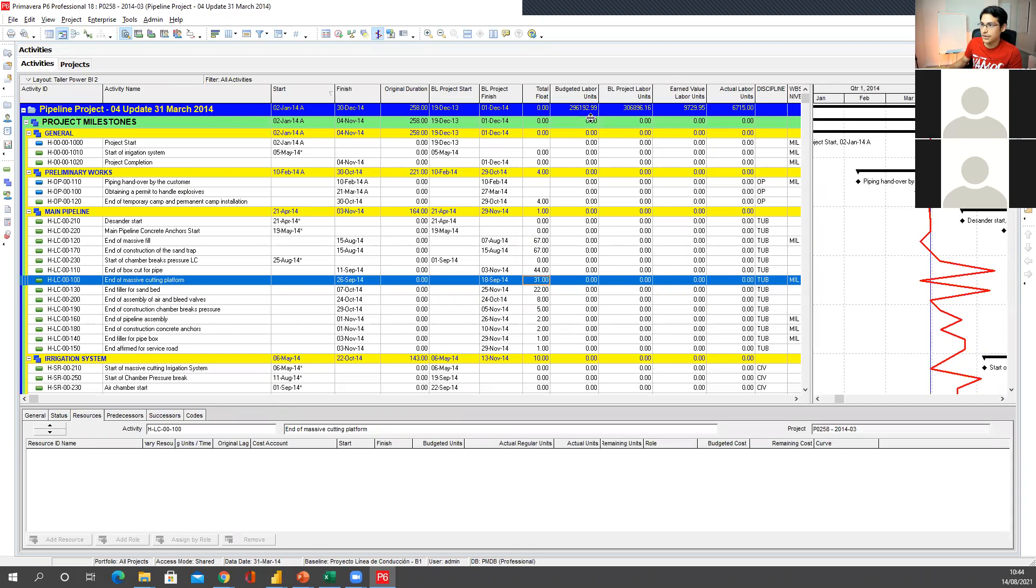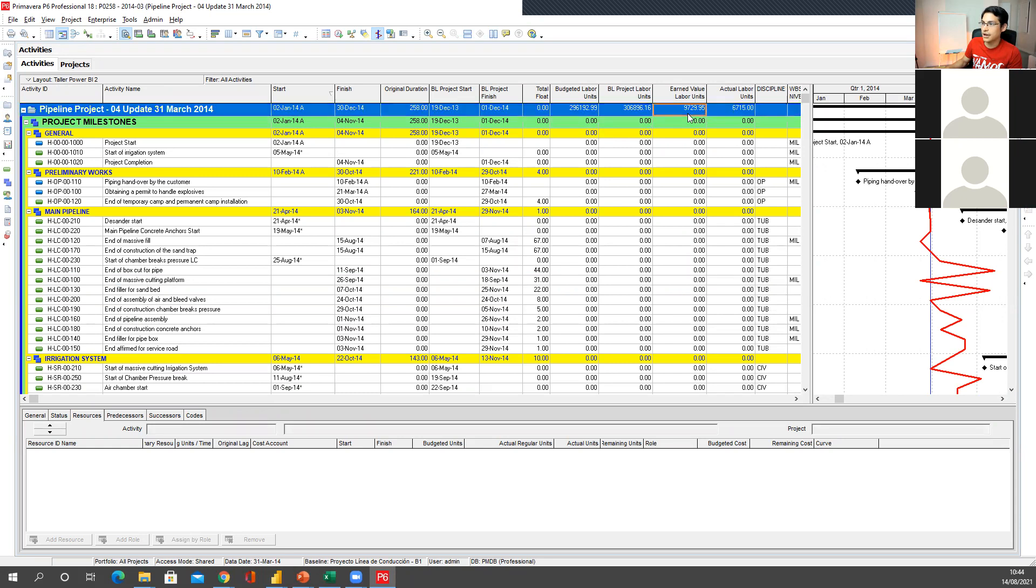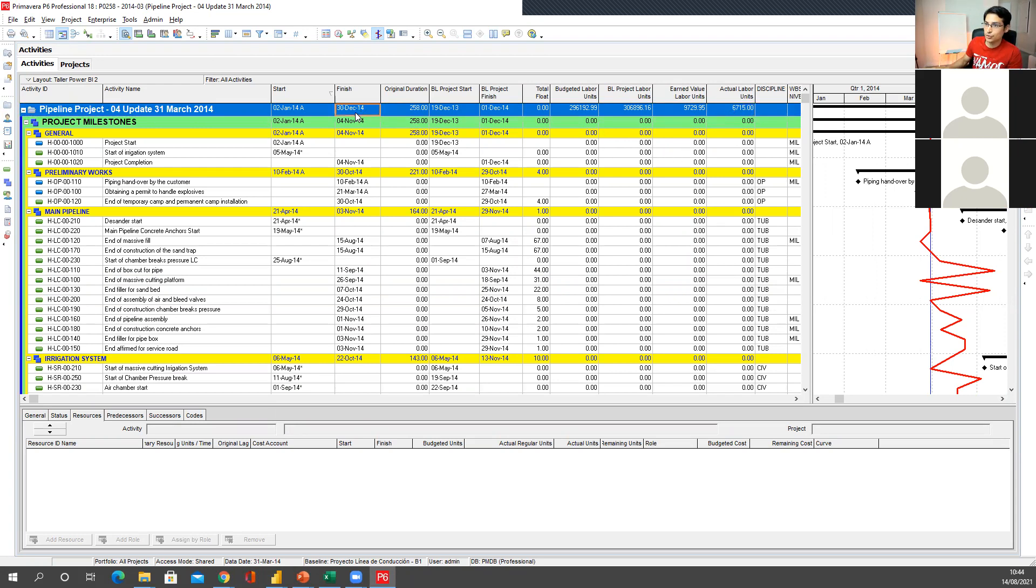And things have moved, right? Now I have earned value units. I have actual level units because I've been inputting that manually. And I have different dates. So now that current finish date has got a big delay in there.